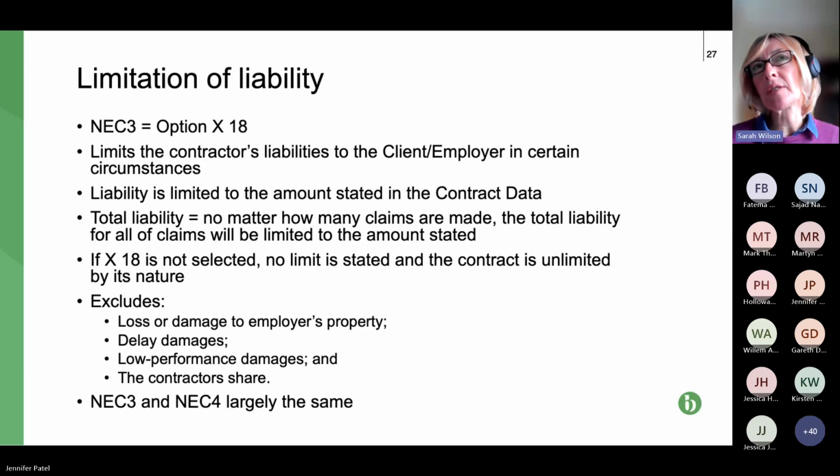Basically, direct losses are anything that, when you enter into a contract, you could foresee the other party incurring in terms of loss if you breach the contract. So, if you're going to build a facility, when you sign the contract, if you think about, well, if the foundations start to crumble in year 3 after completion, what might happen?